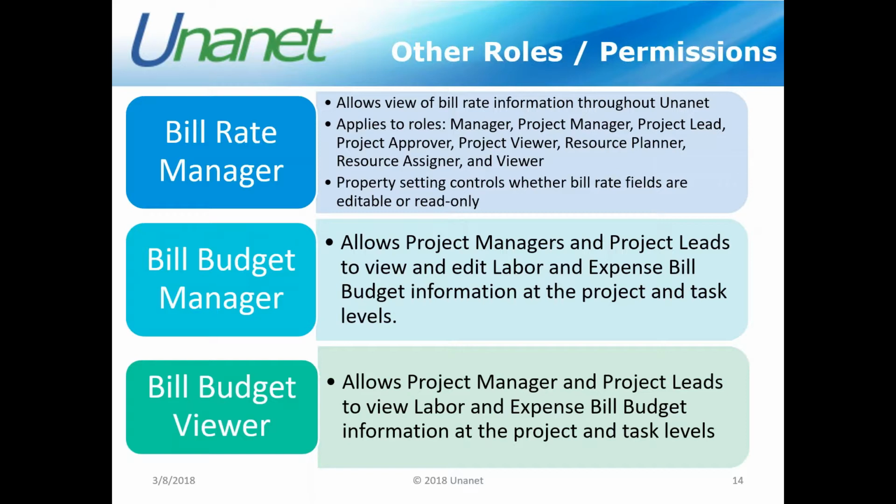So by having the bill rate manager role added on to something like a project manager, a project lead, or a project viewer, when you're running those reports and looking at that information, you're able to see the bill rate and the dollar totals. So if the bill rate's $100 an hour and they worked 3 hours, you'd see the total of $300 out there instead of just a total of hours.